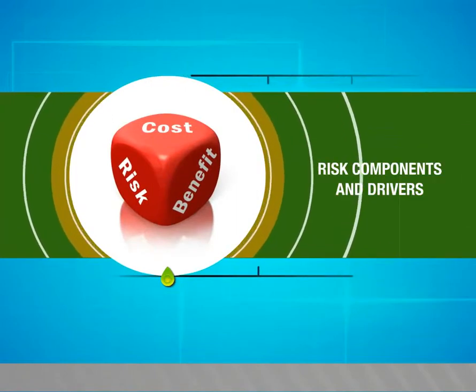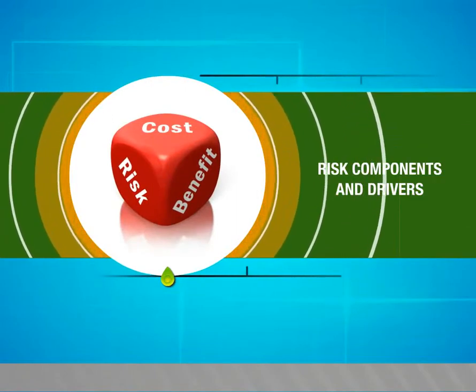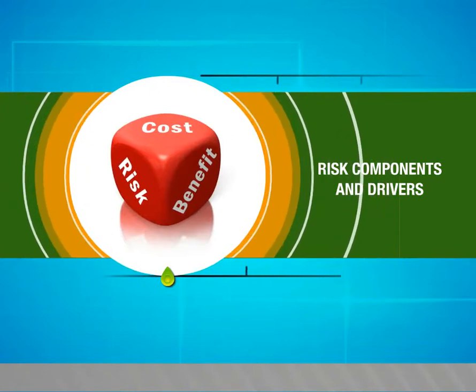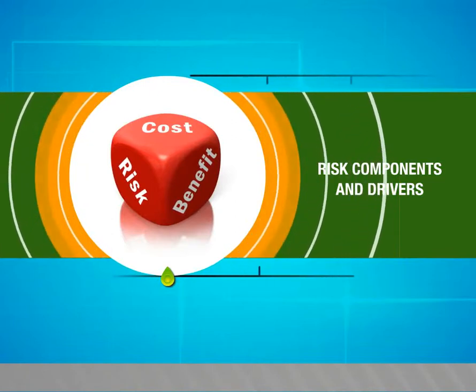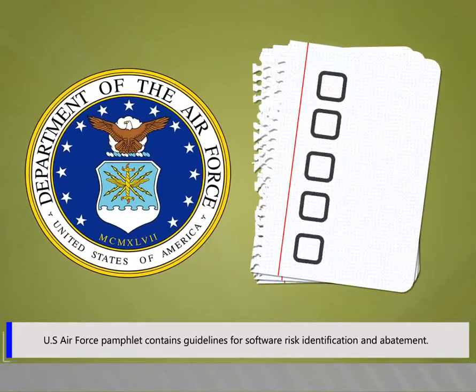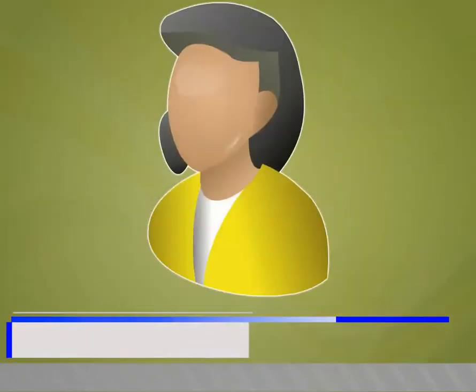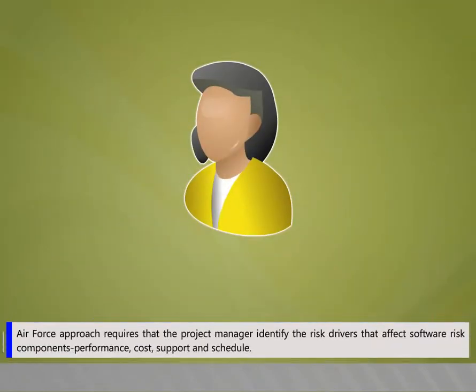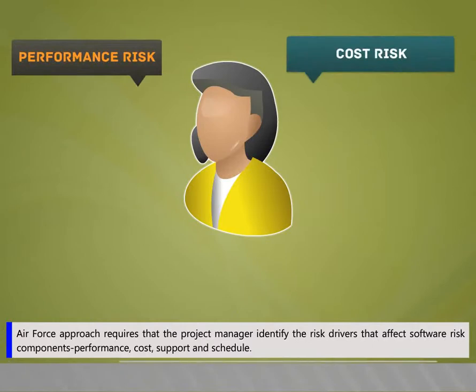Risk components and drivers. In this video, we are going to see about risk components and drivers. A US Air Force pamphlet contains guidelines for software risk identification and abatement. The Air Force approach requires that the project manager identify the risk drivers that affect software risk components: performance, cost, support, and schedule.